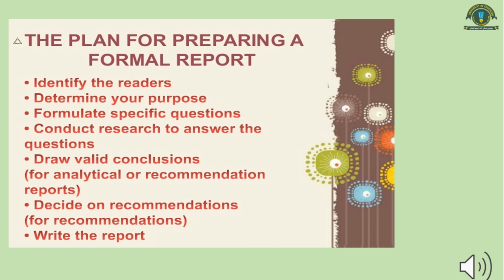After the table of contents, the next step is introduction. The introduction has three main components. The first one is the background, which describes events leading up to the existing situation, what projects have been done previously, and why the project or study is necessary. The second step is the purpose, which defines what the project or study is to achieve, who authorized it, and the specific terms of reference. The third step is the scope, which outlines any limitations imposed on the project, such as cost, time, etc.